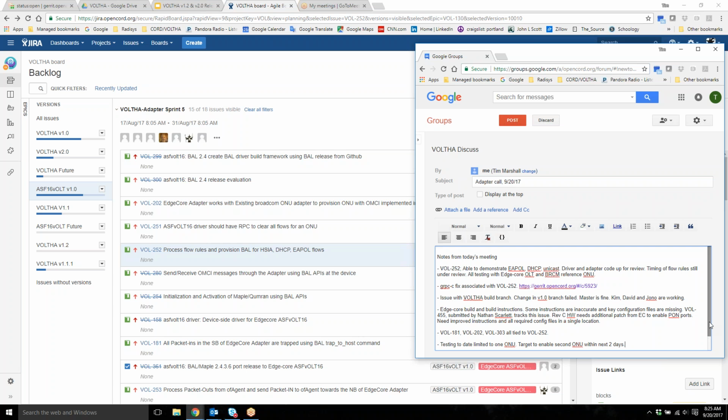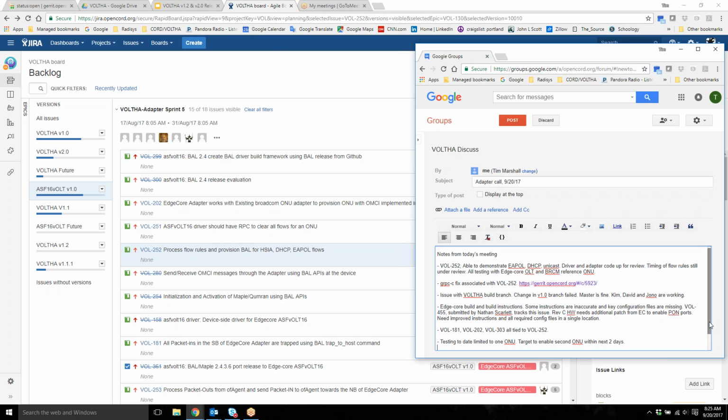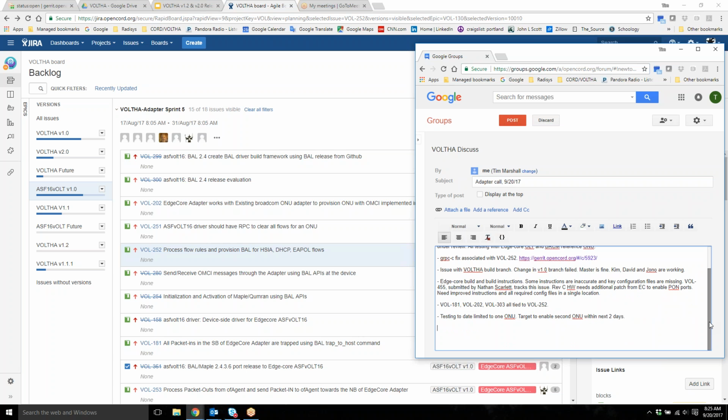Tim, I'm open to inputs, but my opinion is, if TNW works as it is without any modification anywhere in the setup, it's good. If it doesn't work, we can update the community here, and then let's not focus our energy on the TNW. Instead, work on multiple, basically 2 Broadcom reference ONU support, because we have just 2 days and introducing new hardware which has not been tested earlier. Agreed. It brings a lot more risk.